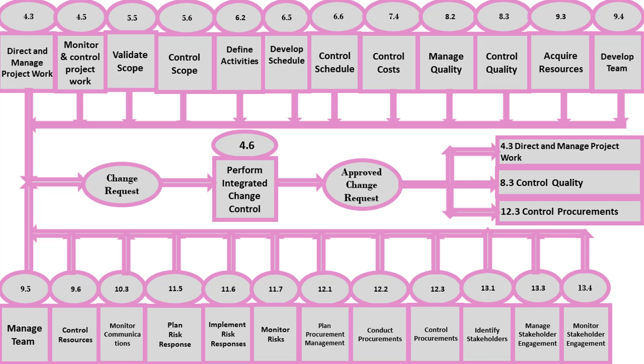Approved change requests can also modify the formally controlled project management plan components or project documents. Once the project manager receives an approved change request, it is his responsibility to ensure it is implemented in the Direct and Manage Project Work process. For example, if the change request calls for the replacement of a defective unit, the project manager conducts the Direct and Manage Project Work process and has the defective unit replaced.